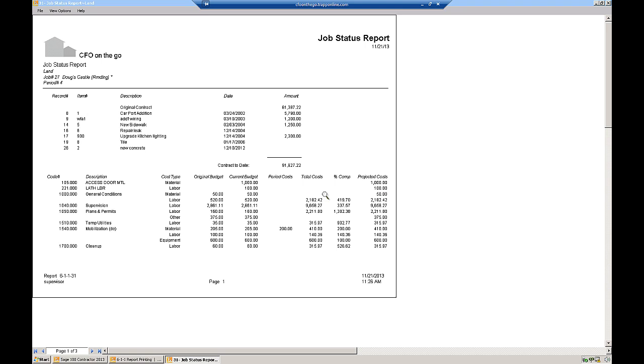And then this is very simple math, by the way. I look at the current budget or I look at the total cost, and I want to know which number is higher. First example, $1,000 budget, no cost. I project out the 1,000. Bad job here. I budgeted 2,900. I've spent 9,700. I'm moving the higher number over, and that's simple to do in Excel.